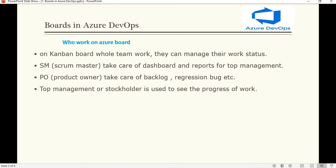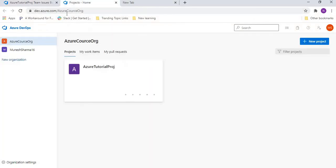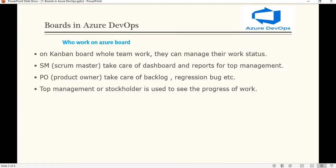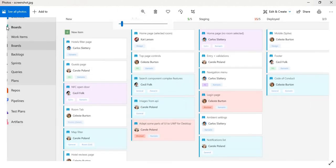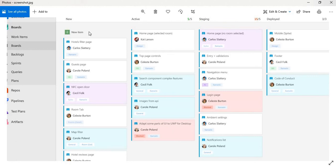Now let's see how the Kanban board looks in Azure Boards. I have an image here — I'll zoom in for you. Here you can see the board has tabs like New, Active, Staging, Deployed, and we can even create new columns as per our requirement. New means a new item; Active means developers are currently working on it; Staging and Deployed show which tasks are in those respective stages.